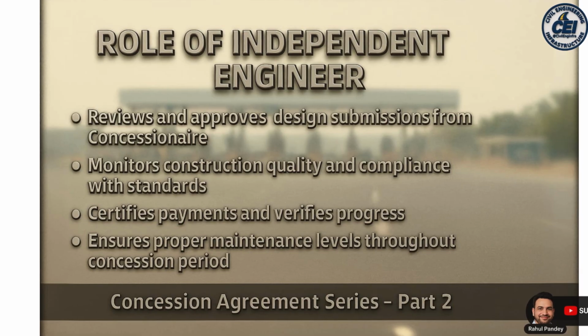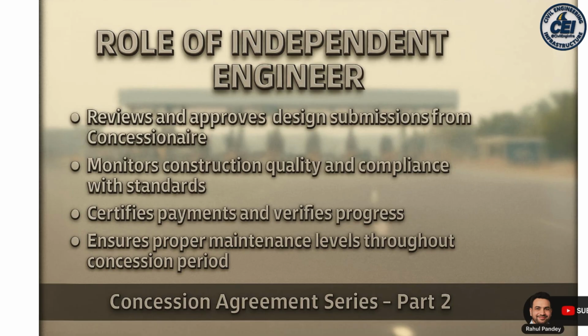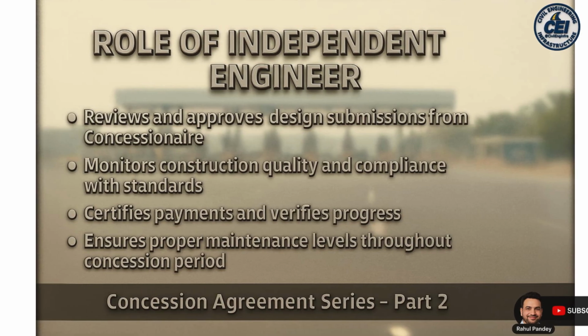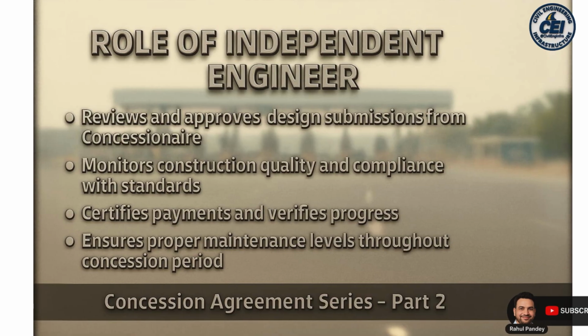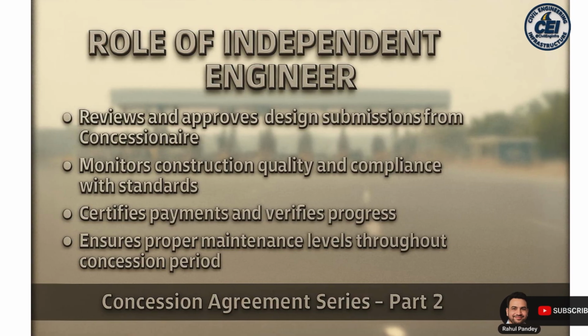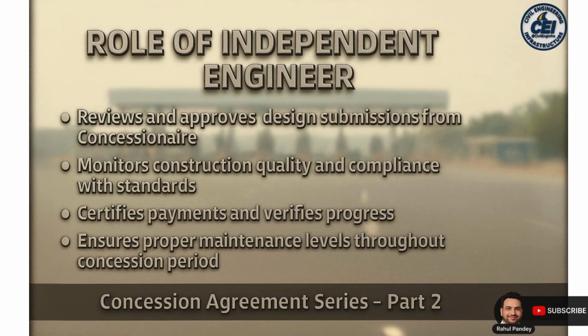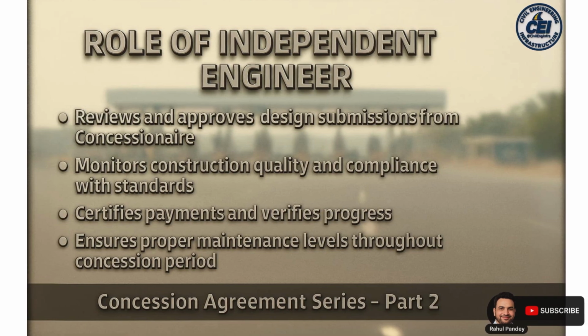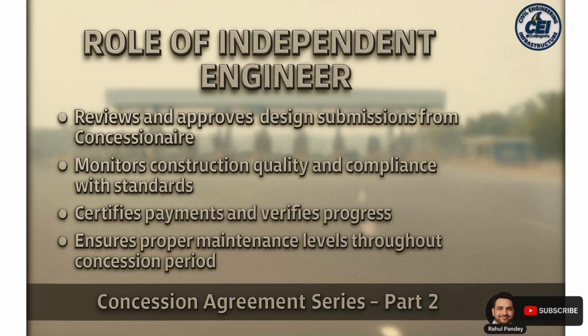Certify payments or verify progress. Verifies milestones and certifies payments to the authority. Ensure proper maintenance levels during concession period. Verifies road condition and service levels during O&M phase. Outcome, the active role of the IE safeguards project quality, transparency and accountability.